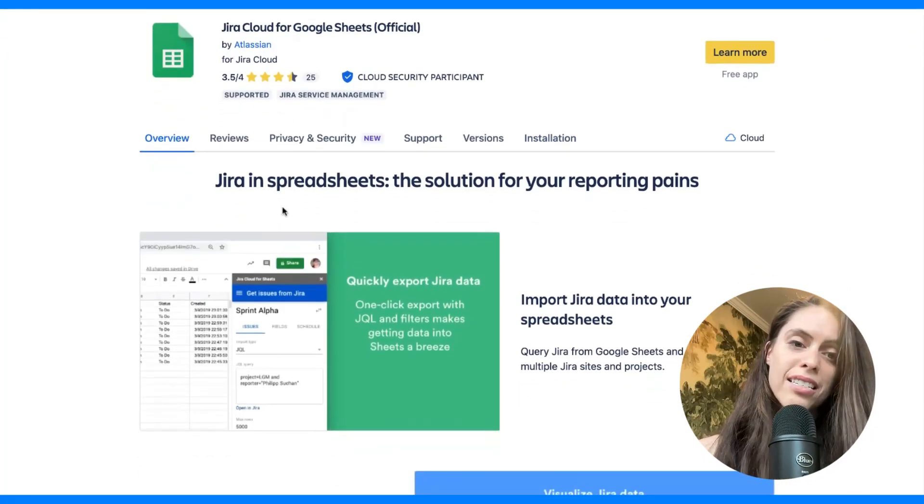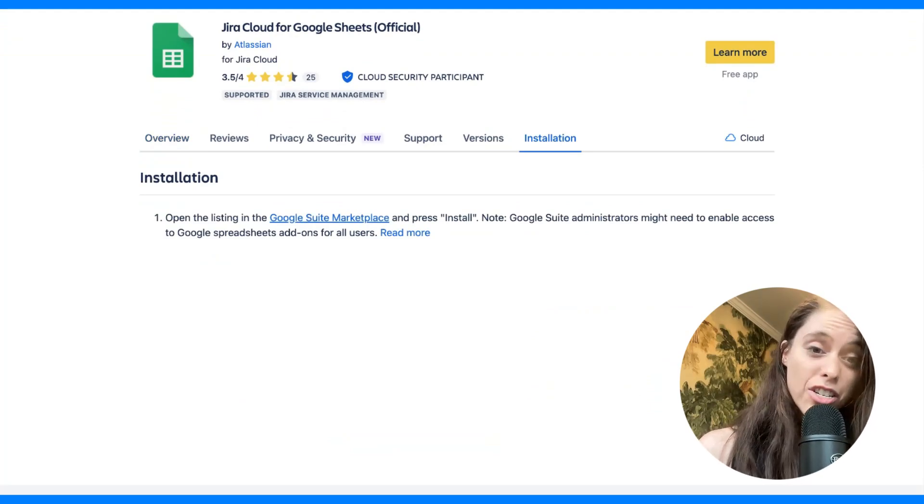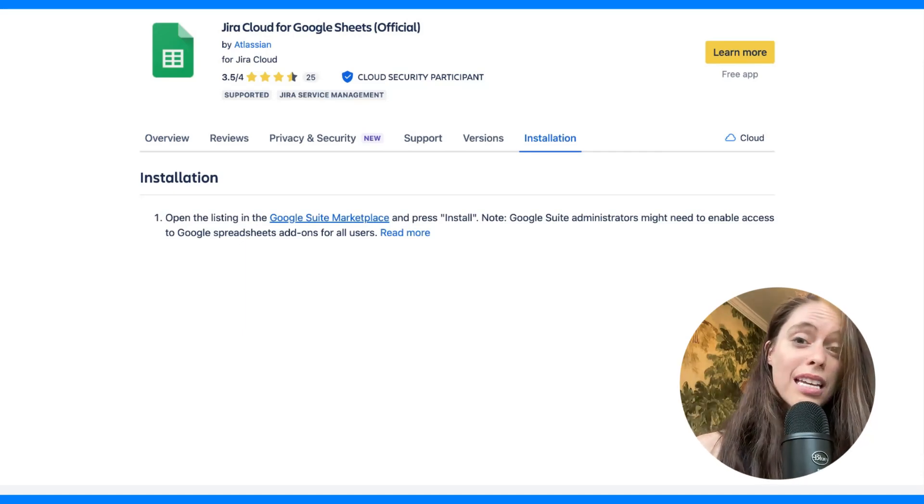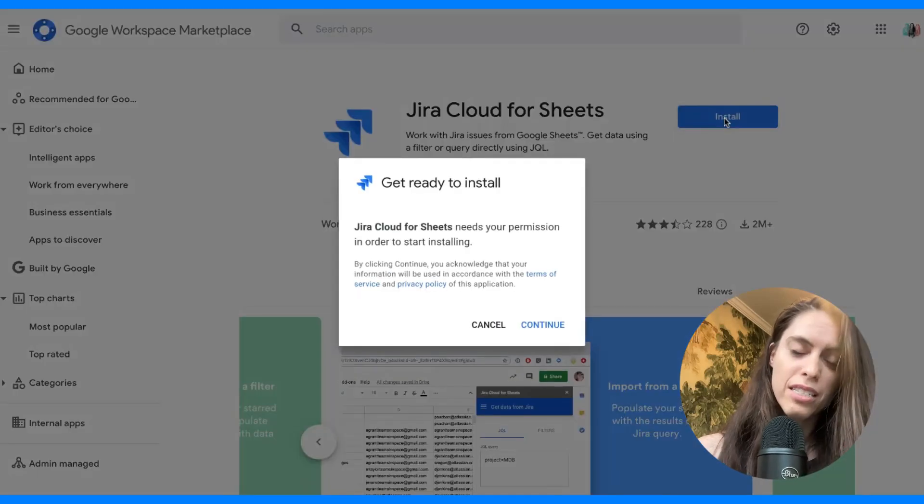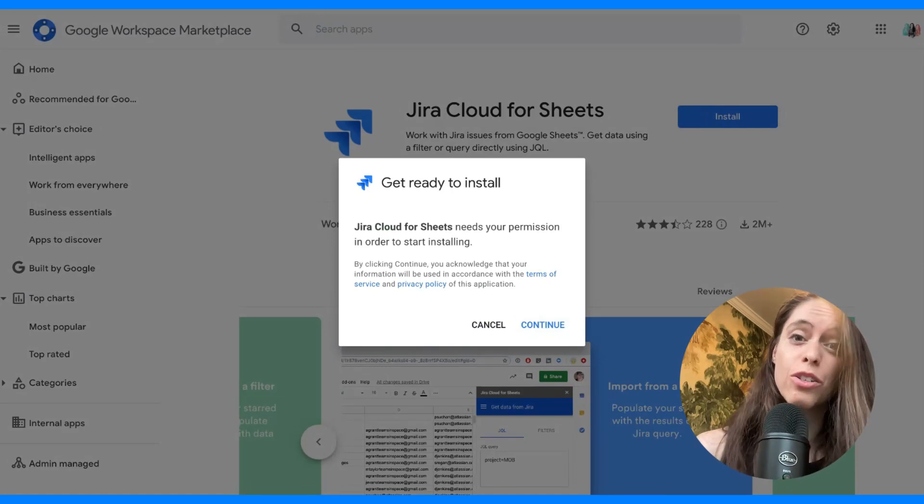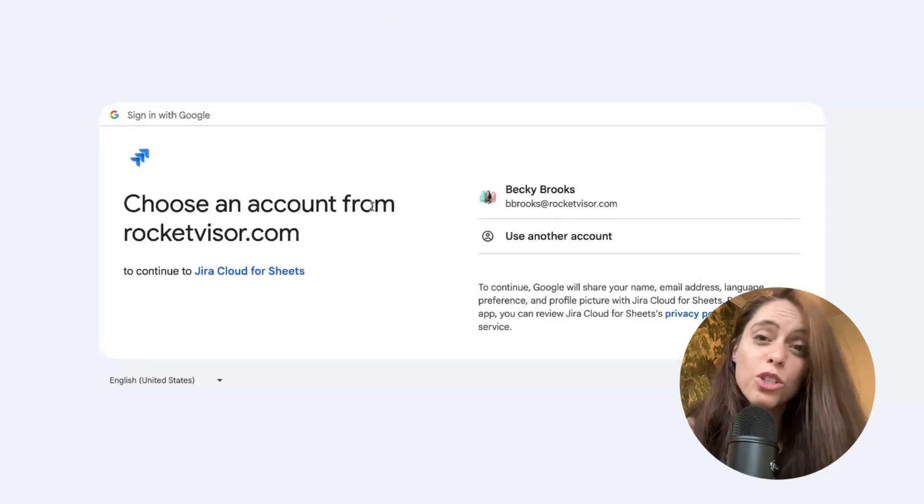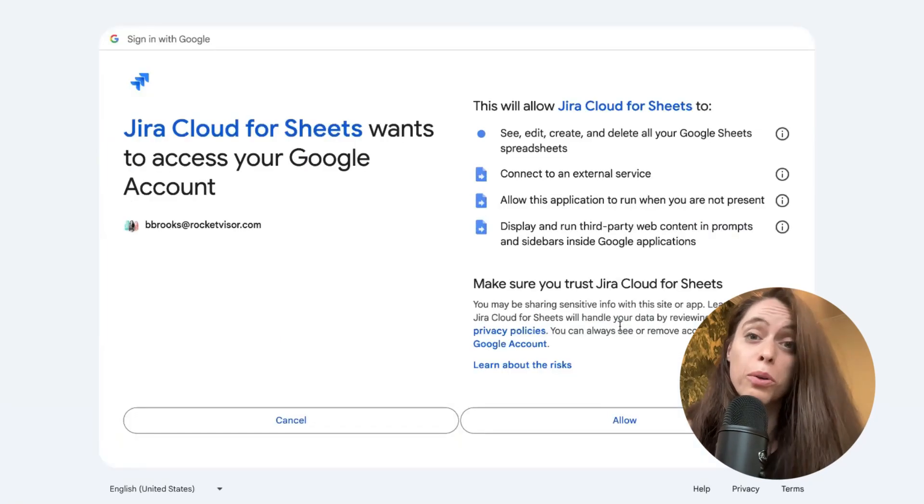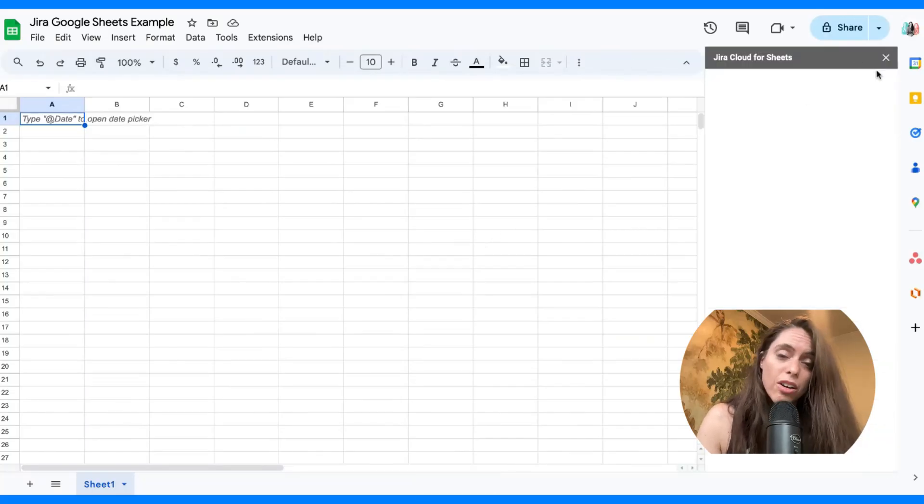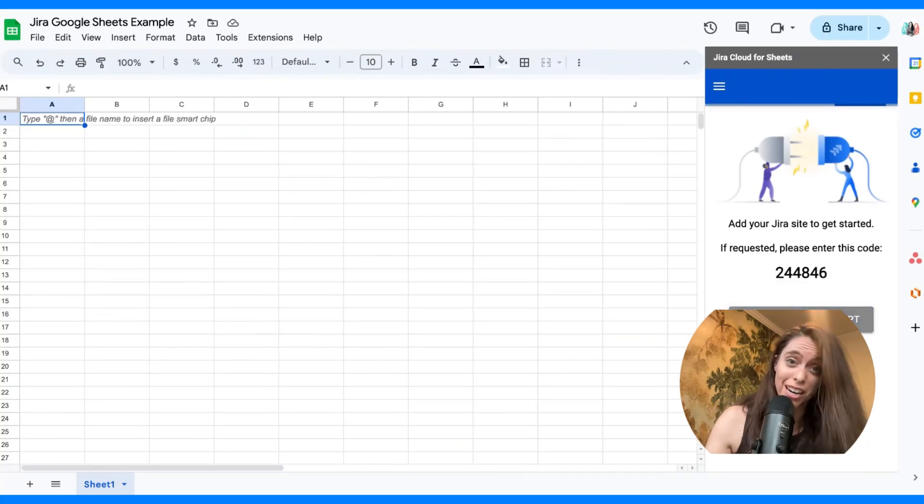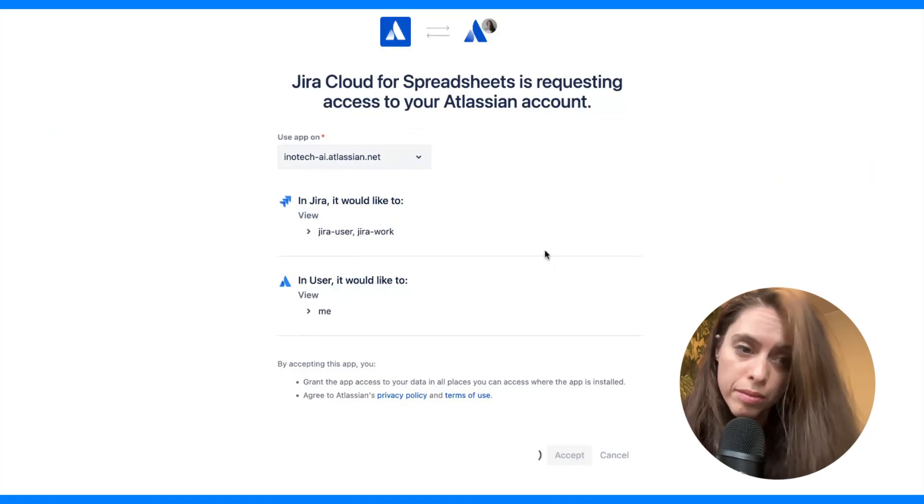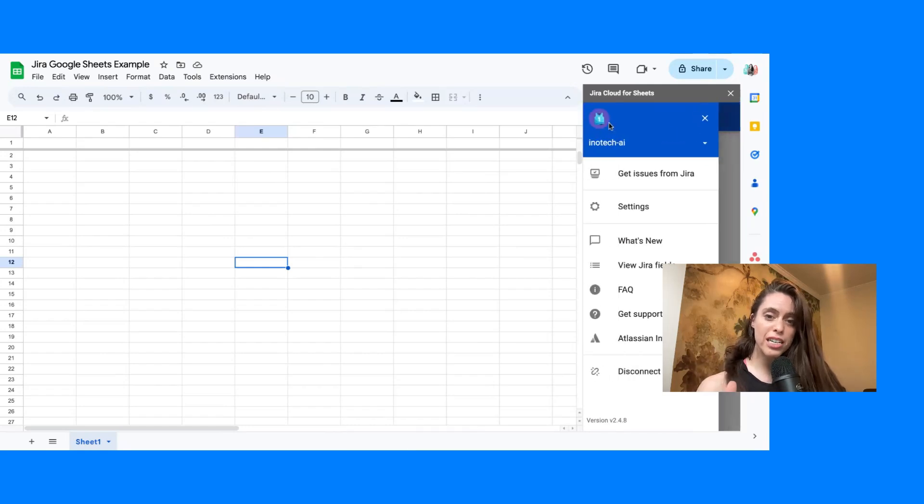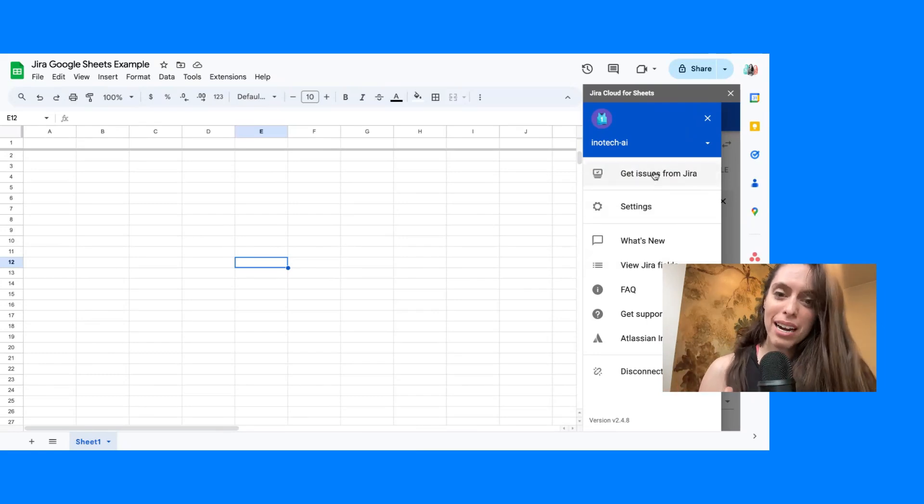Let me show you how you can use Jira Cloud for Sheets. When you're in the Atlassian marketplace, you'll look for Jira Cloud for Google Sheets, and then you'll click on installation. From there, you'll see that you're directed to the Google listing for this Google add-on. Once you're in the Google Workspace marketplace, you'll hit install and give authorization for this app to get added to your Google Workspace. There's quite a few authorizations you'll have to give throughout this process. To make it easier, make sure you're signed in to both Google and Jira. And even when this add-on is successfully installed, you'll still also have to connect Jira to the add-on. Choose the Jira environment that you want to work with in Google Sheets. Then you'll be able to go to extensions, Jira Cloud for Sheets, and see the Jira Cloud for Sheets add-on in your app.